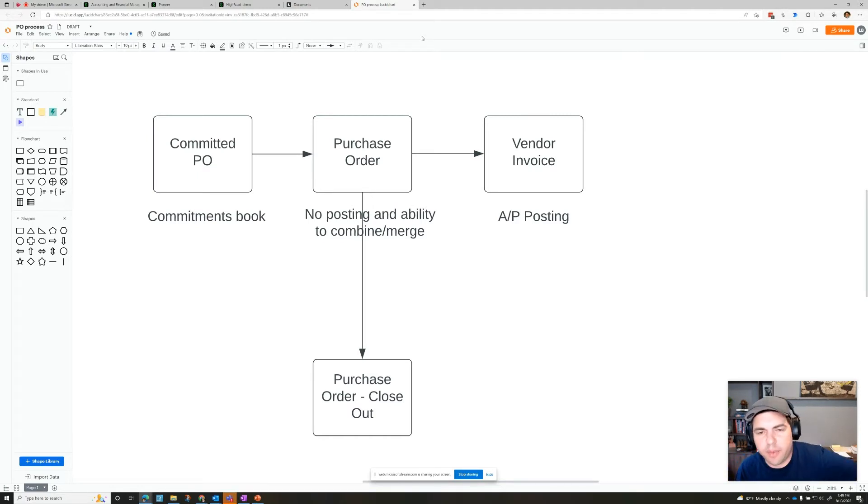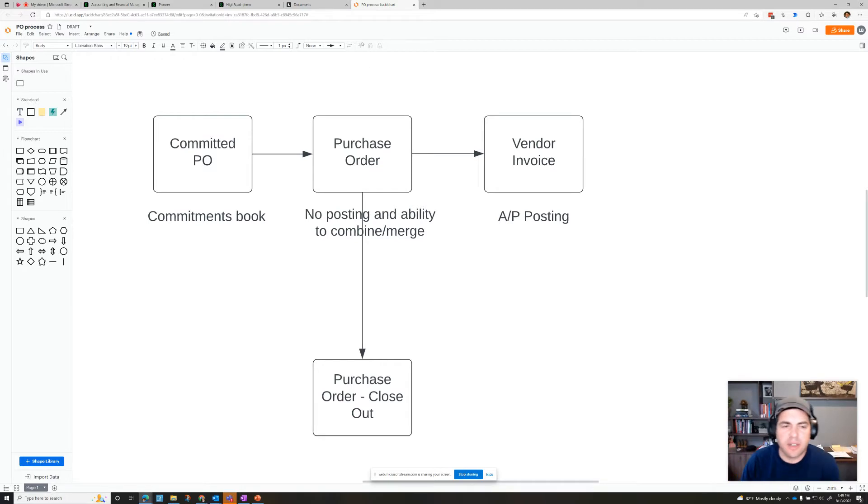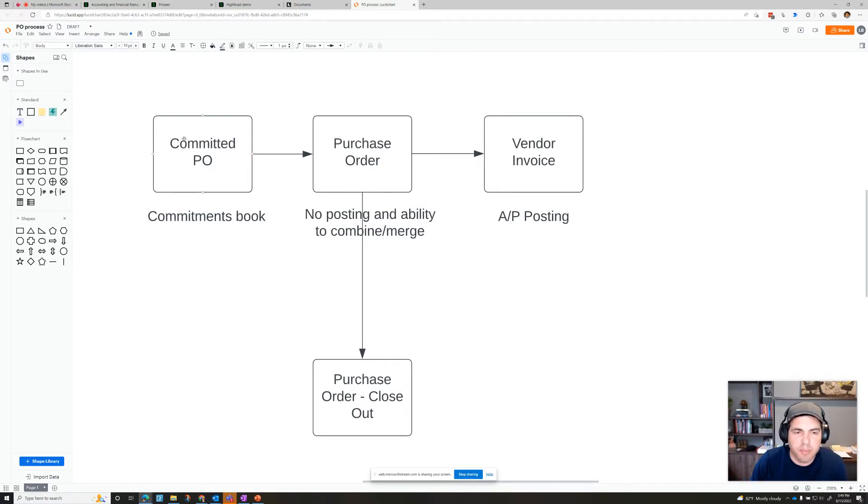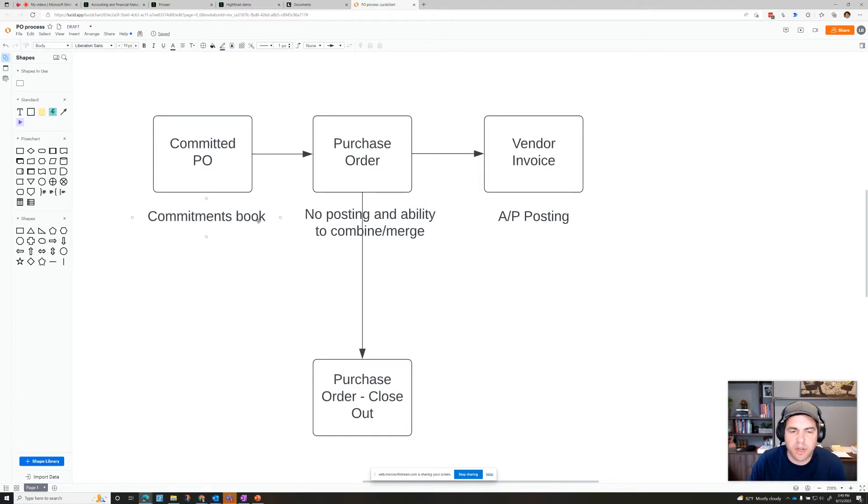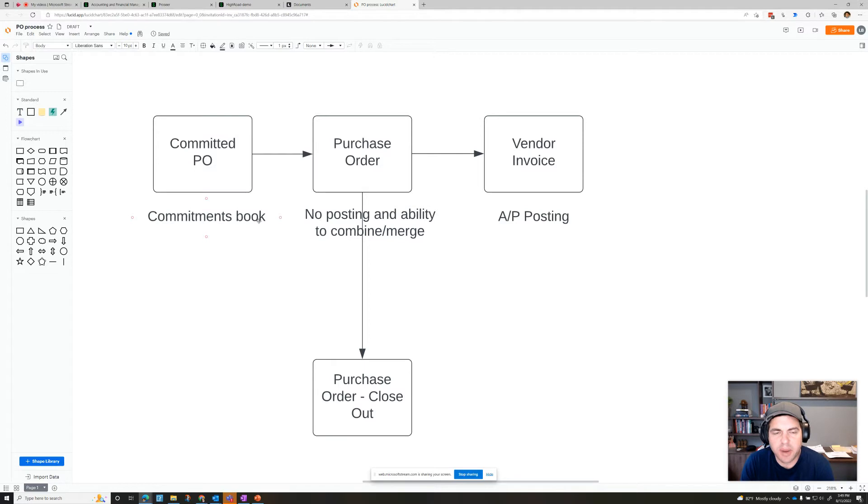So now we have three steps in purchasing. First, we have a committed PO, which posts to the commitments book. And what that means is it'll show on reports how many dollars are committed to a certain cost code and a GL account.